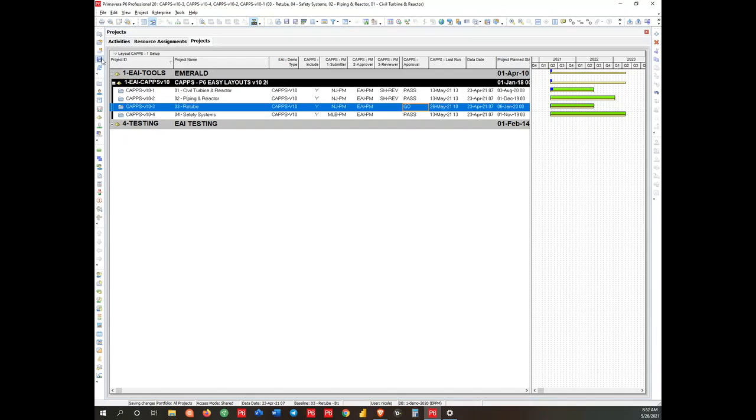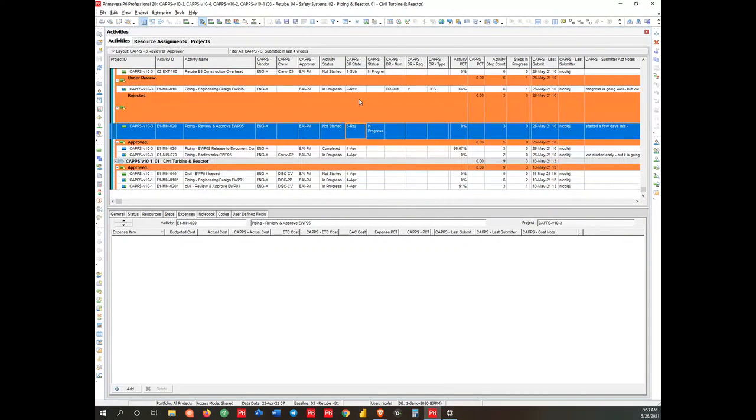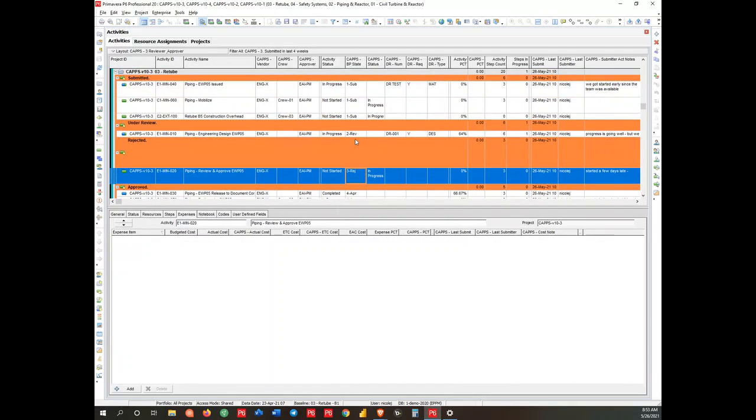I would save that, and then it's going to run in all of the other submissions, and it'll hold back the ones that I put into reject or review. It holds those two back. Everything else that was submitted would be accepted, and again, the variance fields would be cleared for the next run, and the P6 fields will be updated.